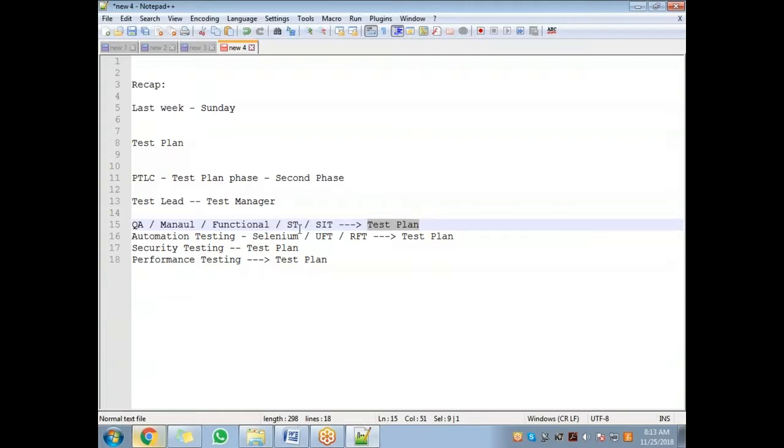Once I started with the system testing test plan, or the earlier version of my performance testing test plan, honestly speaking, guys, the work is usually 10 to 20%. There is certain information that you take from the NFRs and certain information that you collect, and that's about it. So you're good to go. I usually put 10 to 20% of the effort into creating the test plan, whether it's a new project or an existing project.